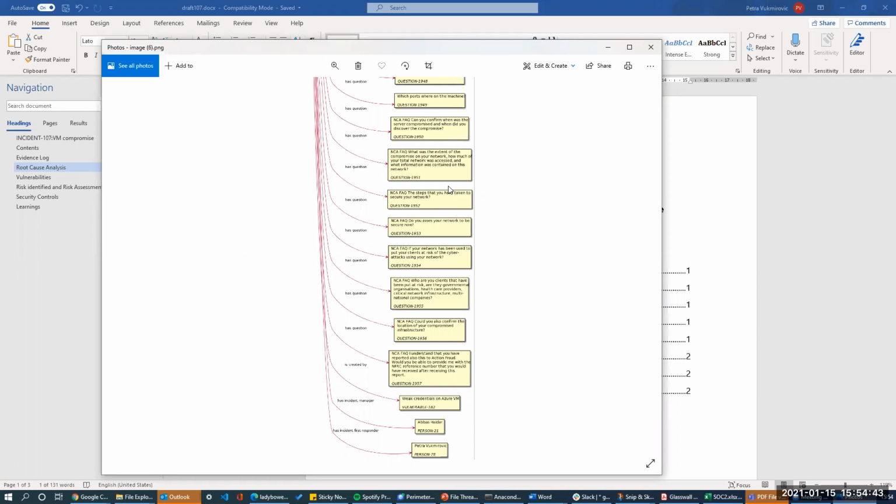So, the same team that's done this automation around the playbooks for the incident automation and generation is also generating some reports which get emailed on a weekly basis with a URL to a Google Sheet and an attached PDF, all of which is automatically ingested into our environment where we do the data manipulation in Jupyter notebooks, and then again push to slides, push to a PDF, push to Google Sheets, and email to the stakeholders. So depending on who the stakeholder is, they might want to consume it in different ways.